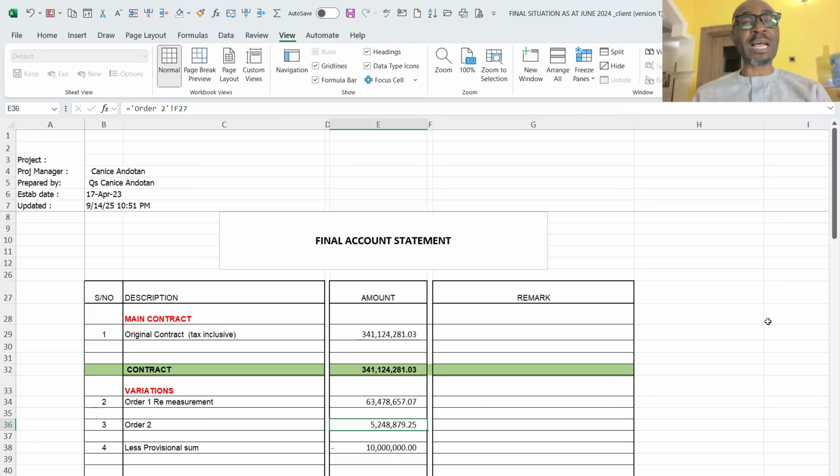Then sometimes, as the contractor's quantity surveyor or the contractor per se, you are obligated to measure the entire project to ascertain if the bill quantities are correct. As soon as you've gotten all the necessary detailed drawings, because sometimes you may plan with your bill quantities, and in the end you might be doing maybe 15% or 30% more than what is in the contract.